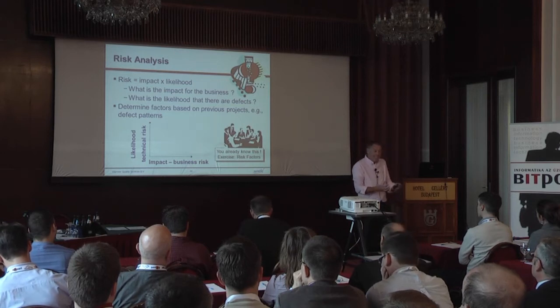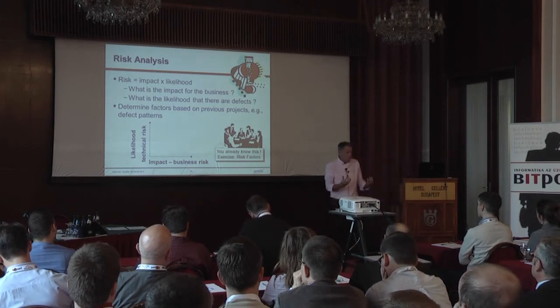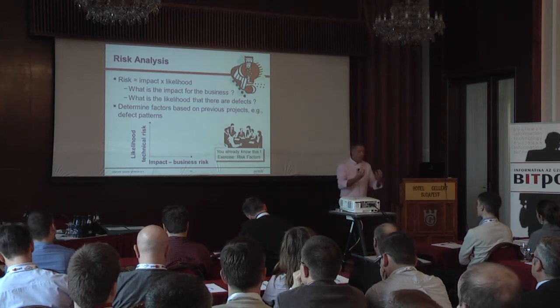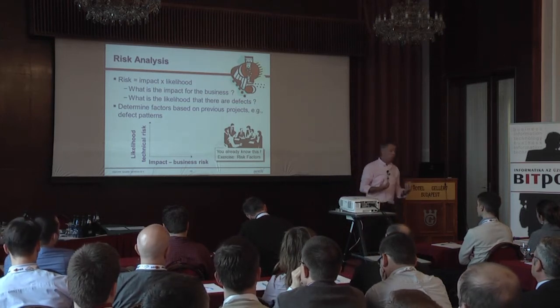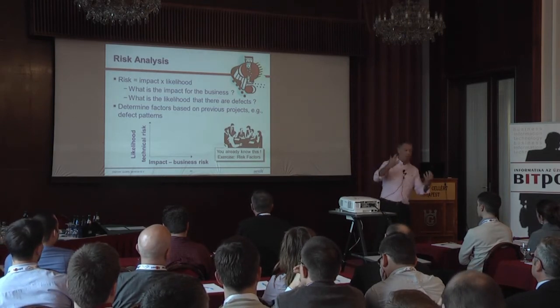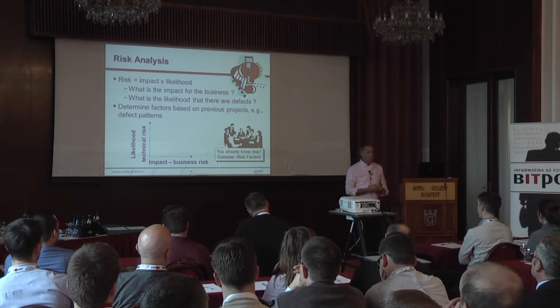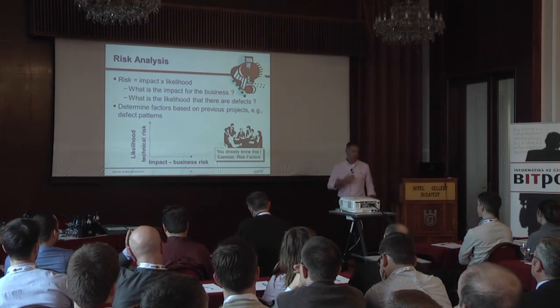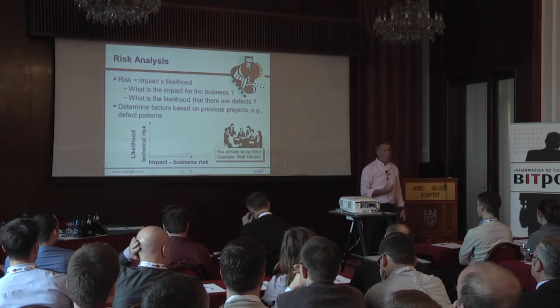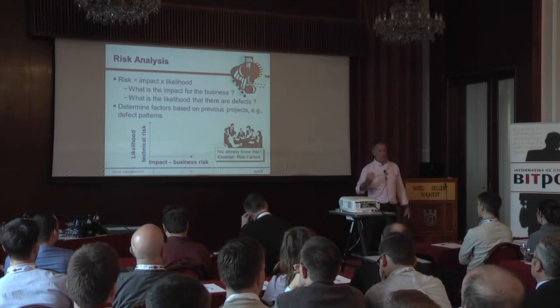And of course, these factors, these reasons, you can talk about in a much more objective way, right? You can actually say, are there interfaces involved? Yes or no, or how many? Is it complexity? Yes or no, and how much complexity? And the same thing with the first factor, what's the impact? There are also factors, reasons, that determine whether there's an impact.